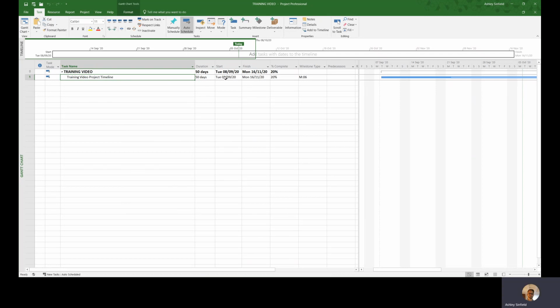As I said, I have added one task for the sake of this video. I've then included the start and finish date for the duration to be 50 days. This is added in my timeline. However, more importantly, I have also marked this task as 20% complete. Project Online looks at the completion of all of the tasks in your plan and amalgamates those together over the course of the entire project based on their individual completion percentages.